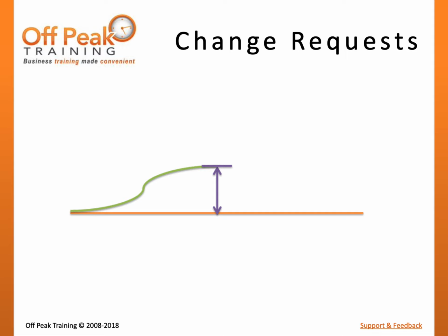All of these scenarios would require changing the baselines. Therefore, a change request must be issued, allowing key project stakeholders to evaluate the impact of the change to the project as a whole. The goal is to perform this process proactively, requesting changes to bring future performance in line with the plan so that variances never get too big.